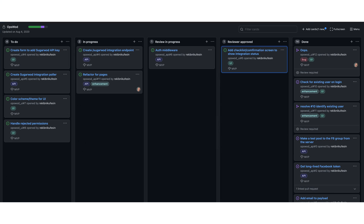For me, I tend to follow more of a Kanban-style model. I break all of my projects down into tasks and all of those immediately go to the backlog. There will typically be a lot of stuff on the backlog. Whenever I'm scheduling out my next couple of weeks of work, I'll grab things that need to get done within that timeframe and pull them over into 'selected for development.' The things I'm working on right this minute go over to 'in progress.'